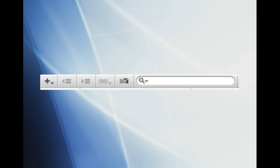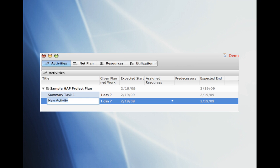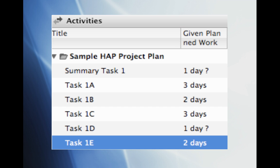Now we can add the new activities to our project plan. To do this click on the Add button near the search bar. We'll go ahead and name our new activity Summary Task 1. Now we can go ahead and add the individual tasks. Go ahead and add a new activity. We'll name our first task Task 1A and give it 3 days to complete.